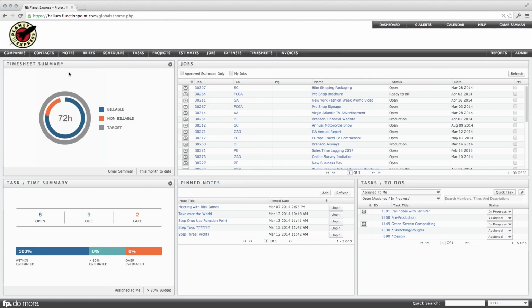But there's also something called the trump card situation, where if the job itself is non-billable, any work that is tracked to that job is considered non-billable, even if it has a rate. I just want to check in with that because that's a little tricky to remember.